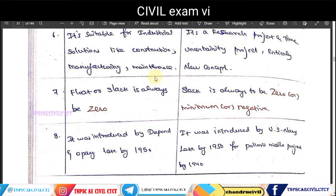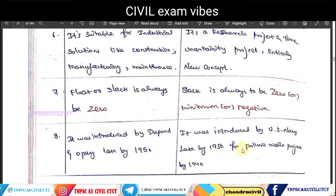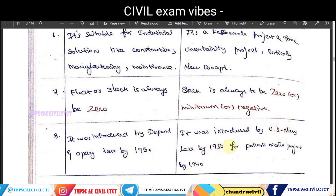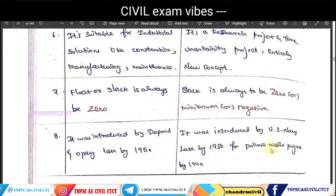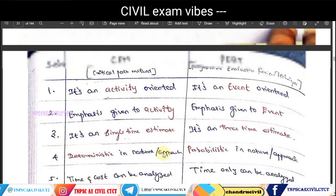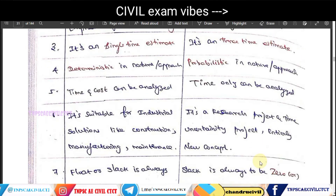In CPM, the float is zero on the critical path. CPM was introduced by DuPont, while PERT was introduced by the US Navy for the Polaris Missile Project in the late 1950s.